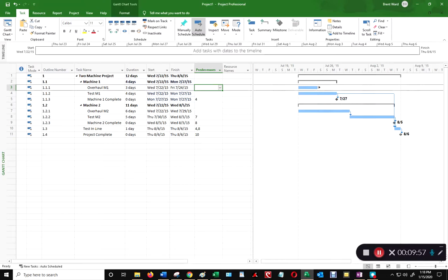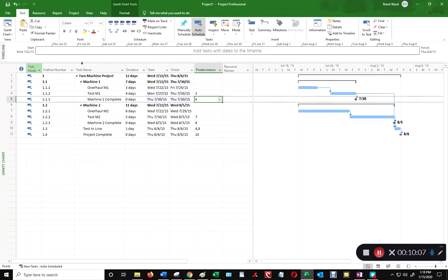And you want to make sure you don't have any tasks that do not have an arc going out into some other task in your project. So I'm going to do this properly again, and I'm going to put 3 here. Now you can see that this isn't just sticking out, it's actually got an arc going into the next task. Milestones, on the other hand, they dangle. You notice how none of these milestones have any arcs coming out of them. Milestones only have predecessors. They do not act as predecessors to other tasks. In other words, milestones are successors, but they are never predecessors.